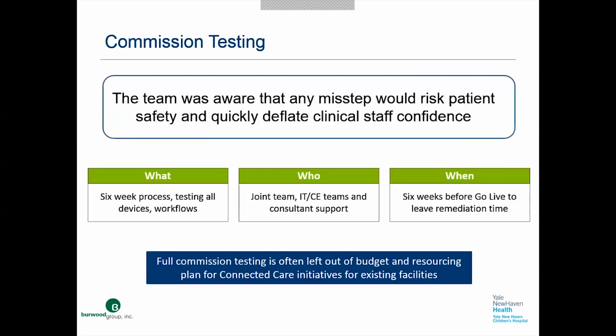There was a 5 to 6 week process and a joint effort between consultants and ITS clinical engineering testing all devices, alarms, and workflows. In fact, there were many days I left the unit and Sam and her team were testing, and I came back in the morning and they were still testing, and I figured they had never left. This is not typically in the budget plan. Also during this testing, downtime processes were developed for planned and unplanned downtime.